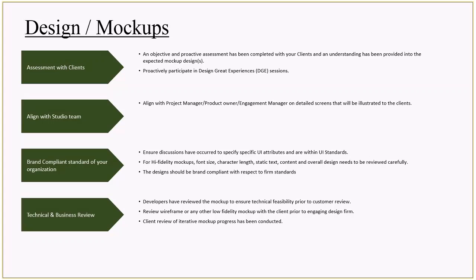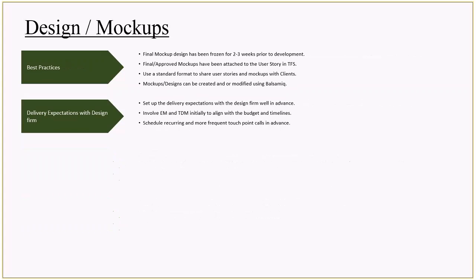We need to review those with our client and try to get a sign off. Best practice is that the final mockup design has to be frozen 2 to 3 weeks prior to the actual development sprints.